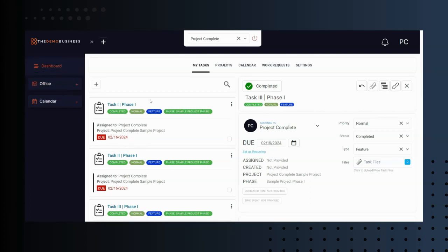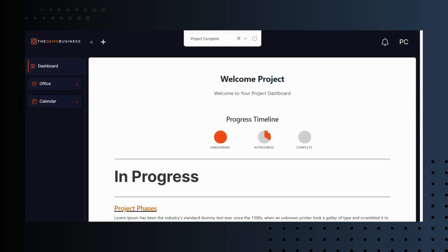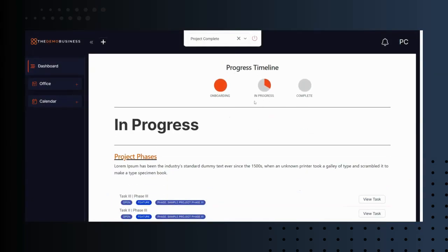And because of that, if we just happen to go back to our dashboard, we're going to see that there's some progress there, because we connected the 3 phases to our automation, not the individual task. I know some people do that, but I found that doing it by phase is a little bit better, because you can add different tasks.